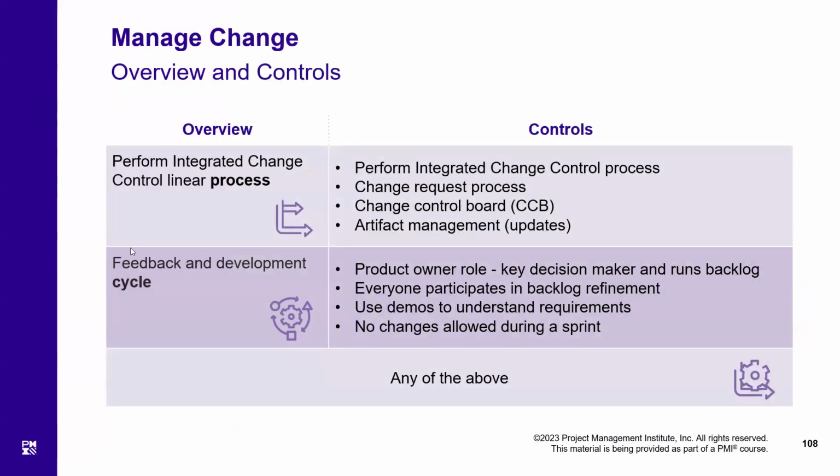Okay. Now, how do we manage change in a predictive project? We have a process in monitoring and control which belongs to the integration knowledge area. Rather, we have two processes, but the one which deals with change control is called Perform Integrated Change Control.